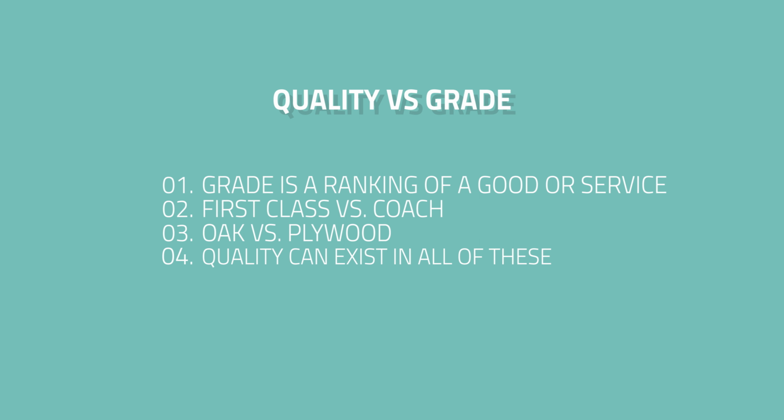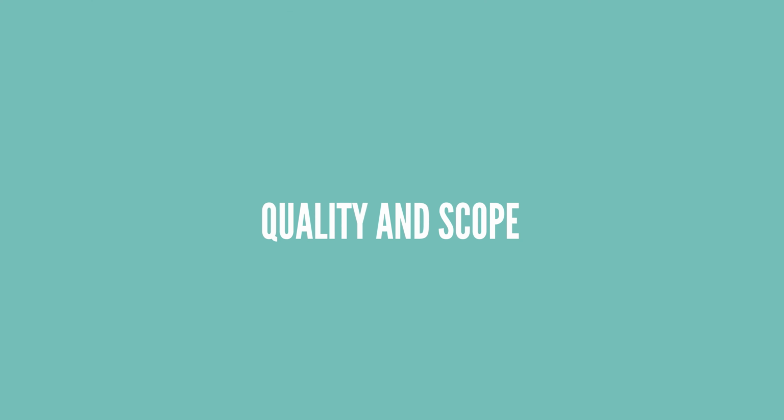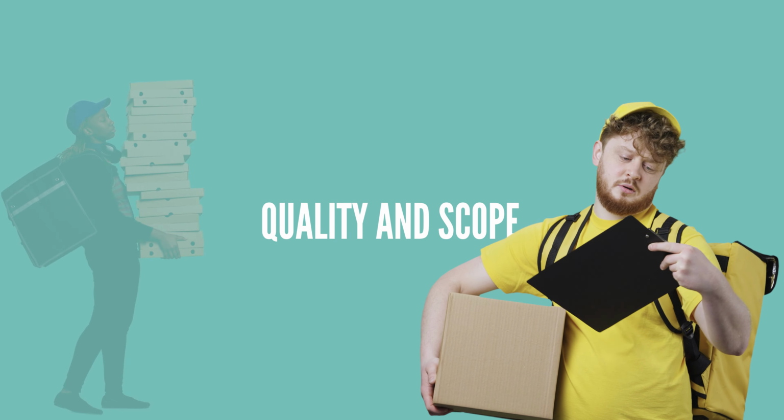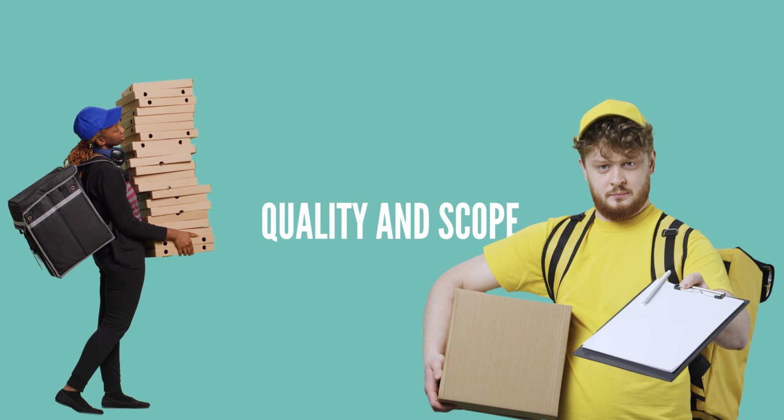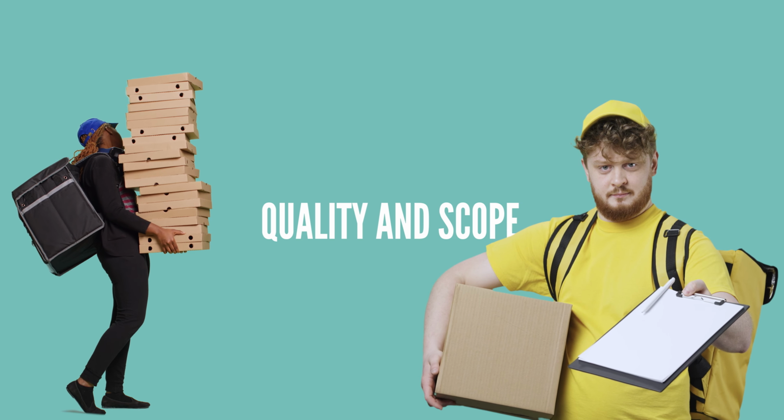I like to say that quality and scope are interrelated, that if we meet scope, exactly what was promised, we are going to meet quality. So quality is a conformance to requirements. So requirements are defined in scope. Quality is a conformance to scope, that we don't underpromise and underdeliver, and we certainly don't underpromise and overdeliver. But a lot of people say, oh, I want to underpromise and overdeliver. That's actually delivering more than what the customer asked for. That's like using oak when plywood would have been appropriate. We need to know exactly what we are to deliver so that we can exactly deliver quality.